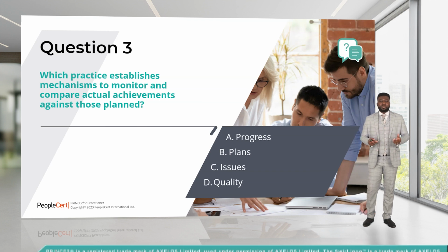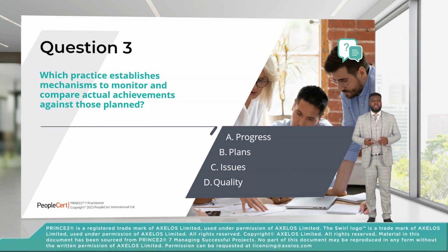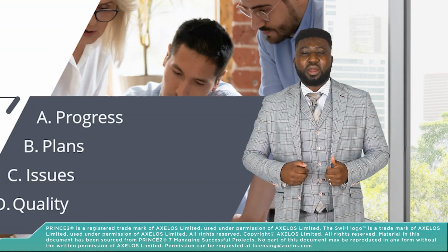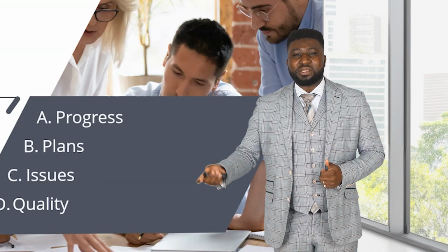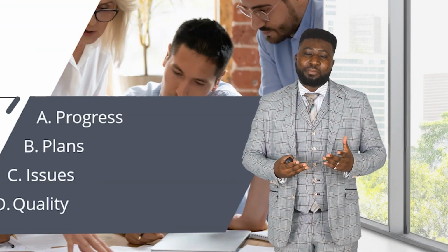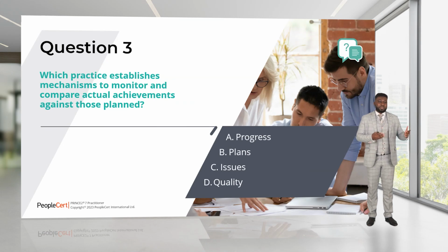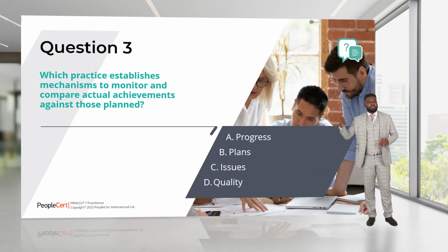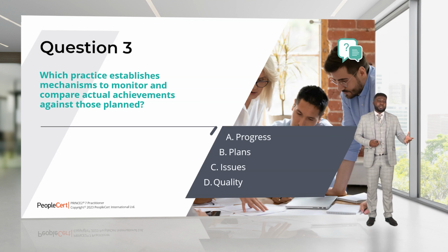When we look at issue practice, issue is about making sure that we have a way of monitoring the baseline in case something changes. We have a way of baselining our product. We know we have 3 types of issues, so if a customer wants to change something, they'll go through the issue management procedure. If the customer receives something that doesn't meet the expectation, they'll go through the issue management procedure. This is how we resolve things.